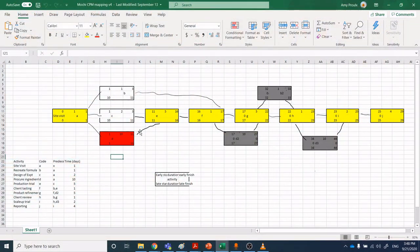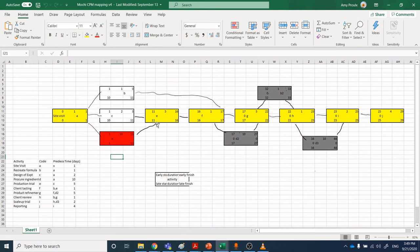Going back to our mochi ice cream example: let's say we modified the supplier constraint and found a new supplier, reducing delivery time. Now the new constraint becomes Step E — production trial and product refinement. This is where we need expertise in formulation to go in and hit that formulation really quickly, using good food science background, food chemistry, and understanding of technical ingredients to refine the formulation step critically and effectively.